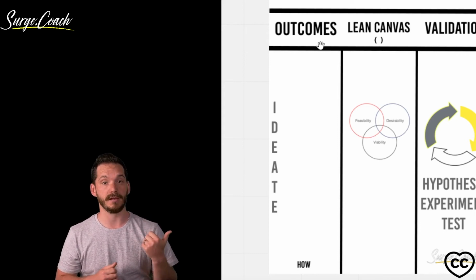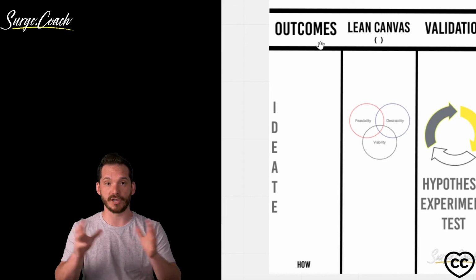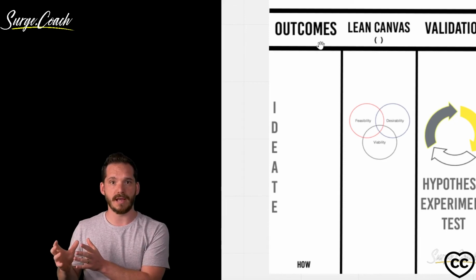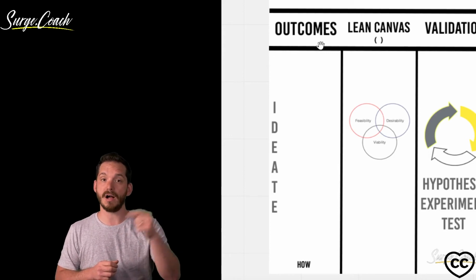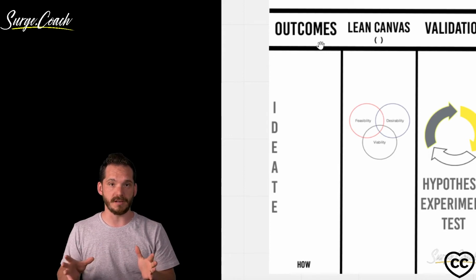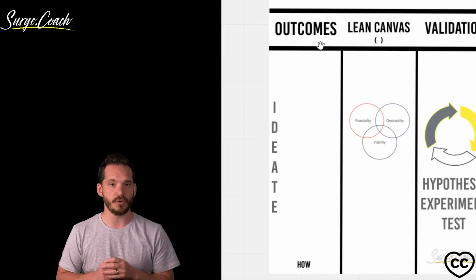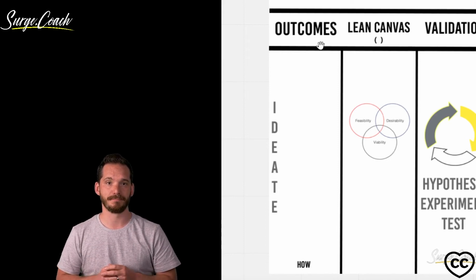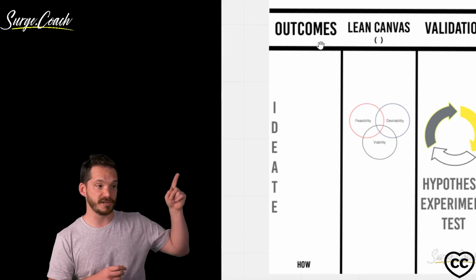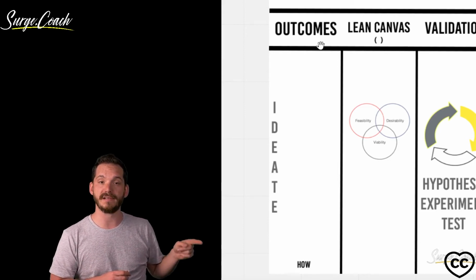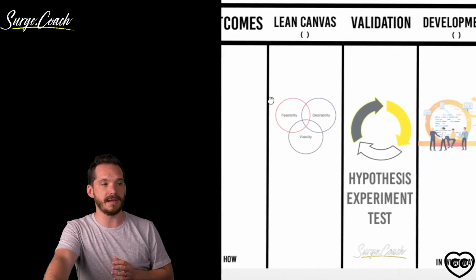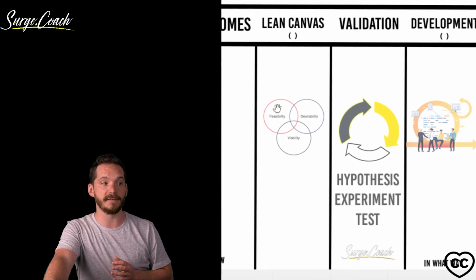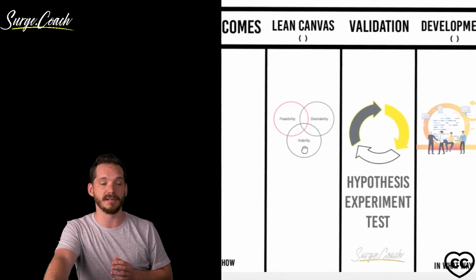As you can see from here, you could have your strategic direction, your OKR models, and you could have 3 or 4 objectives. You may grab one of those and ideate. You may come up with 50 different outcomes that could help you achieve your objective. These could be 50 projects, and this is okay. 50 projects go along the ideation how phase, and they're prioritized into a single backlog. We move into the lean canvas phase, where we're basically going to look at the feasibility, desirability, and viability.